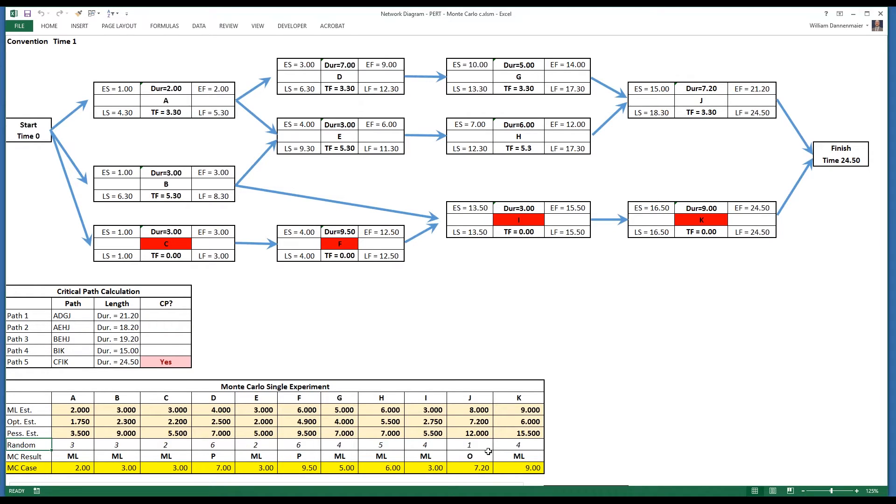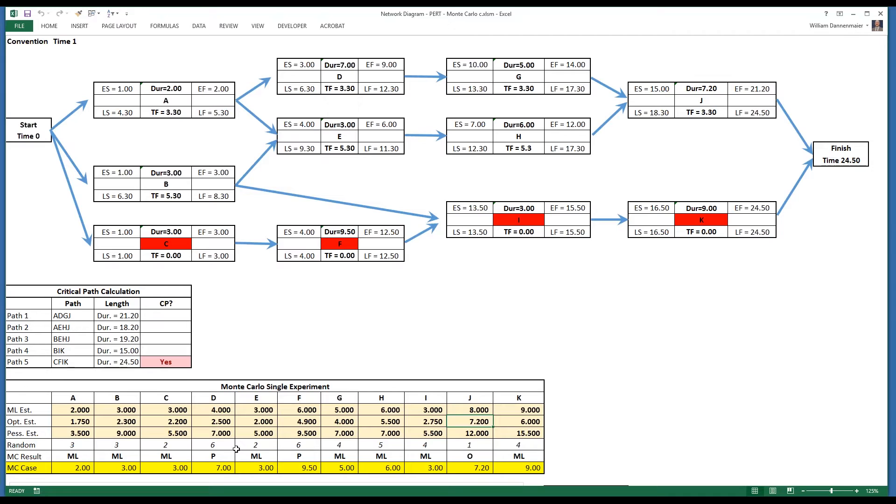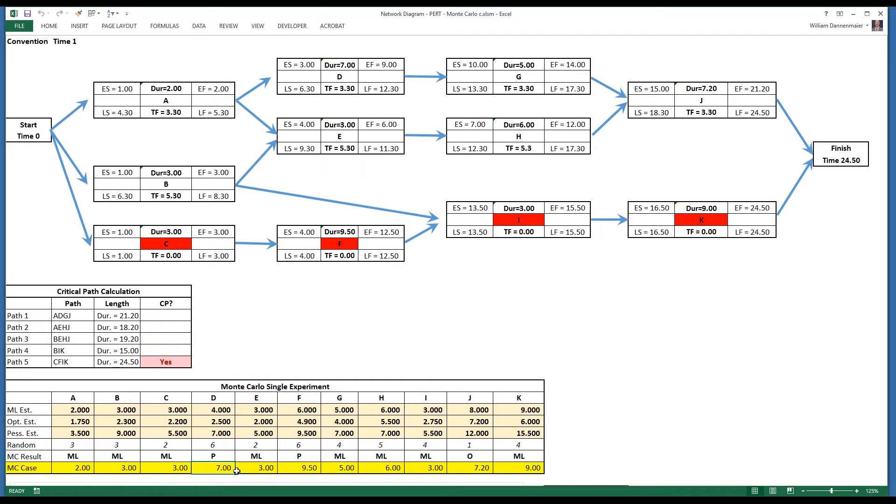If the random value is one, such as we see here on J, an optimistic scenario is selected, and the optimistic value is pulled from the table above. If the random seed is six, a pessimistic result is given, and the pessimistic estimate is shown below. For all other cases, two through five, the most likely is chosen for each one of the tasks.